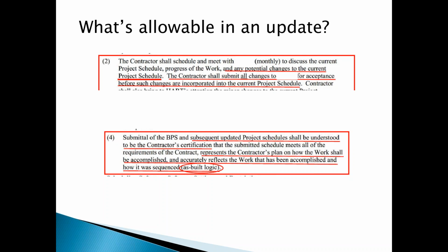If a schedule is restricted from being changed, then it will become somewhat unreliable, because it won't be reflecting what's going on out in the field, right? But on the other hand, if there's too many changes that are made, then it may look like whoever's doing the schedule, or the contractor, has abandoned their work plan, right?